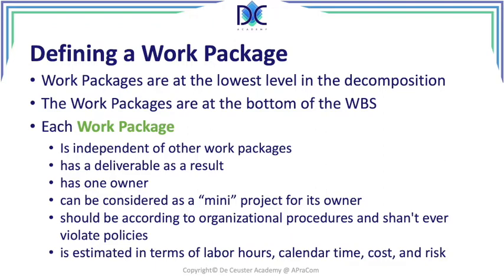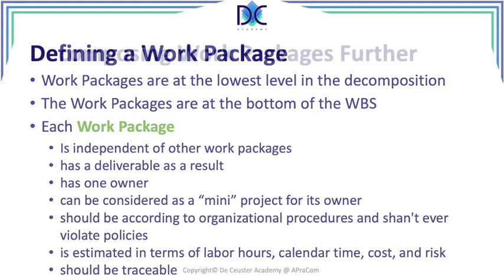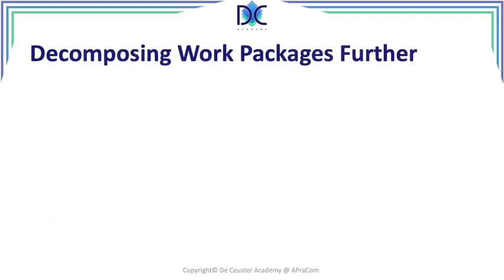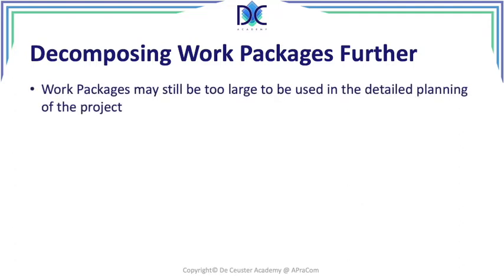We have to further decompose work packages to be able to plan them in our detailed project plan. Now the work packages may still be too large, but in some cases work packages will be like activities — we cannot decompose them further. In that case, we don't have to do it.